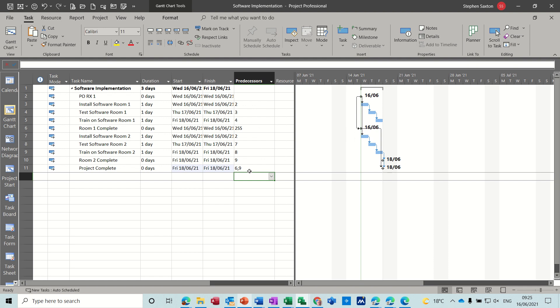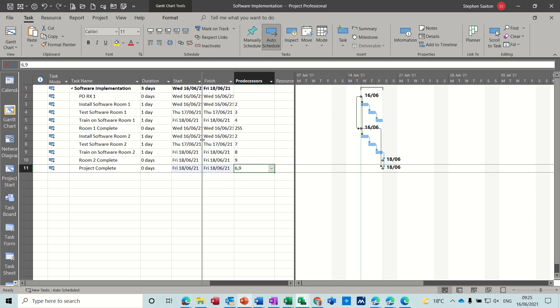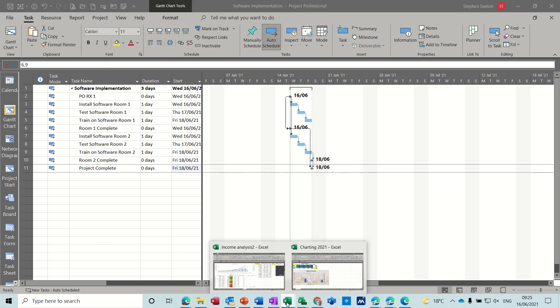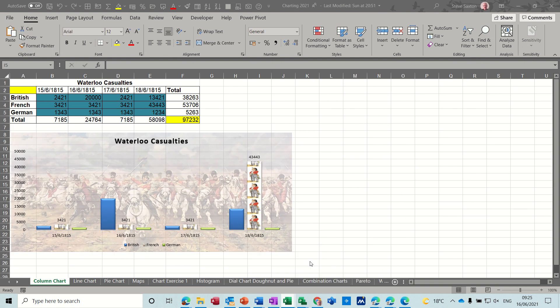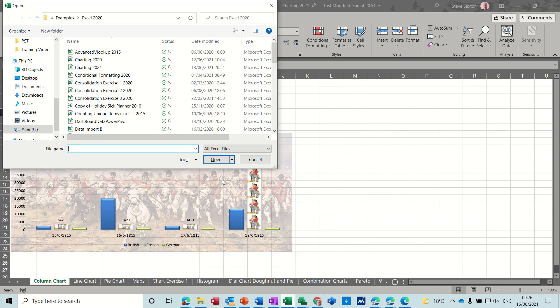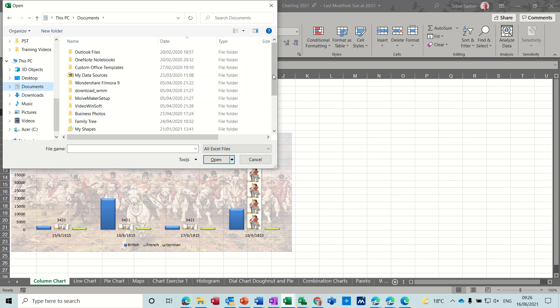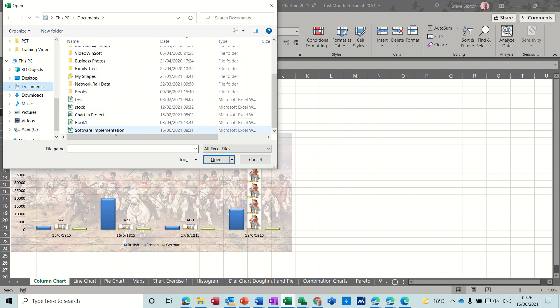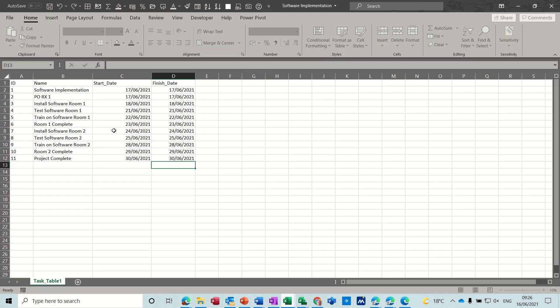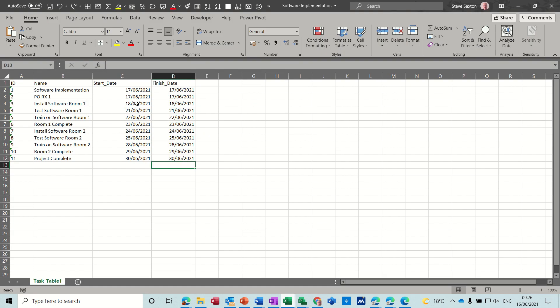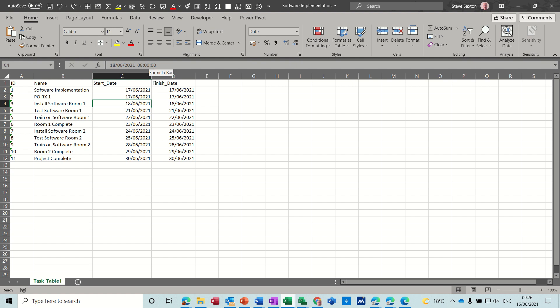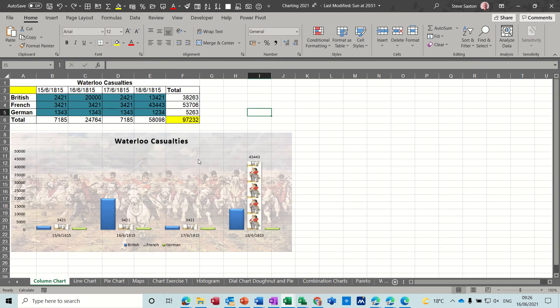Now what I did in Excel, if I open the Excel file, I'm just going to Excel and open an Excel file. I want to open a file, there's a source file for that that we just brought in, just to mention something. So this is a source file in Excel. Now what I've done, obviously it's just straightforward task names, but on the start date and the finish date I've actually put the date time. You can see the date and the time there and the finish. And that's just a mouse, so, going to a task there that finishes on 1700 and that starts at 800. So that's all I've done on that one, that's the change. I'll just close that.